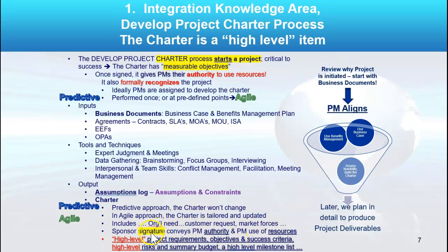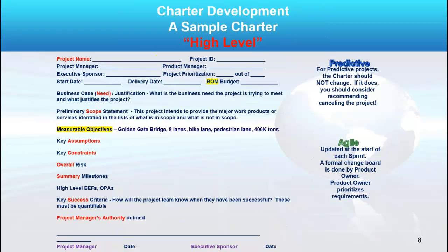Remember, the project charter should be signed by the sponsor or sponsors. It gives the project manager authority to use resources, and it formally recognizes your project. Here is a picture of what might be in a project charter. It's just meant as an example, nothing that has to be here. Notice for today's conversation, a rough order of magnitude budget, or a ROM budget. Also notice your project name. You want your name along with the sponsor, and then both of you should sign it.